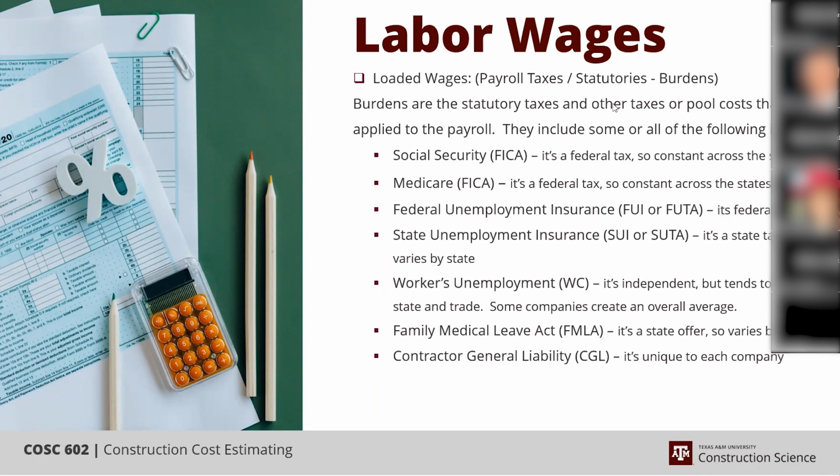So you're making $10 an hour. You're working 50 hours a week. Now that's a 1.1 multiplier. So you're now at $11 an hour average. And then if you have 10% for your PTO, multiply against that, now you're at $12.10 per hour. So that's your base comp now, $12.10 per hour. And that's just pretty much a base comp. And so that extra $1.10 that we added for PTO, each paycheck, the worker never sees it.